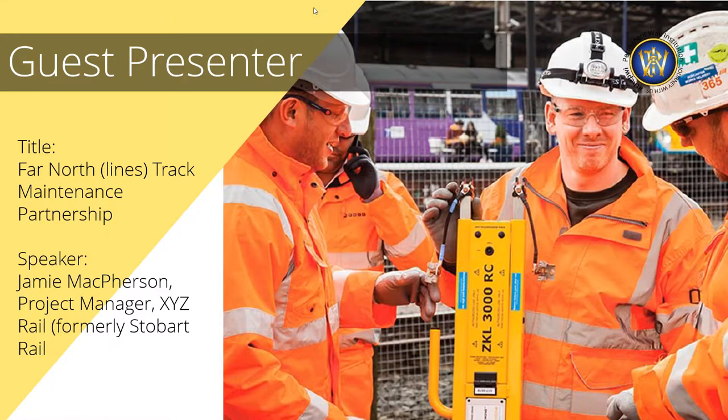Sure. At Osinard, we actually installed either 800 or 900 yards of sleepers completely just outside of Osinard, because it became apparent that the area coming out of the station heading north was really poor. So we did a 1 and 3, return back to the start, 2 and 3, return back to the start, 3 and 3. Hopefully that's held up. Sure, yeah.